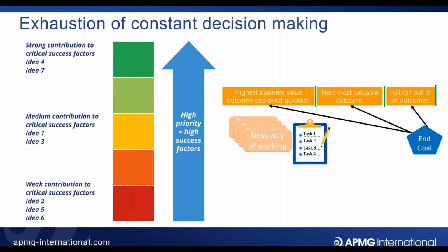And that decision making, as we know, many of us work with people who are experts at procrastinating. So I have to spend quite a lot of time persuading people to take a decision. I provide them with all of the information, all the data that enables them to decide, if you like, the MoSCoW prioritization. What is a must-have? What is a should-have? What is a could-have? And what is a won't-have this time? But actually, I find that I have to spend a lot of time encouraging them to make those decisions, because it feels to them like, oh, we'll leave it till later, till we've got more information.